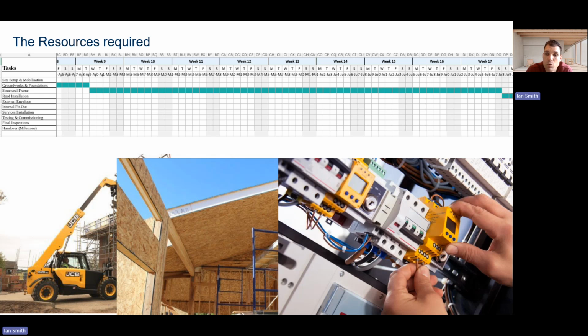Again, the lifting plant must be stored and positioned in the central lifting zones and must be stored in the plant zones to ensure safety. And this resource is justified because safe lifting capability is essential for installing heavy components such as roofs and solar panels and preventing manual handling risks or delays.